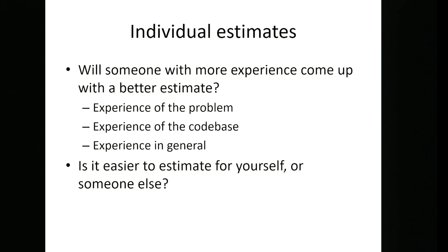So they will nearly always be optimistic in their estimates, because they don't want to say to someone, well, I'm saying this is going to take an hour, and in an ideal world it would take an hour, but actually I'm going to have a cup of coffee, or I need to go and get some water, or someone might come and have a chat to me in that time, and that will slow me down. And you don't want to include that, do you, in your estimate?